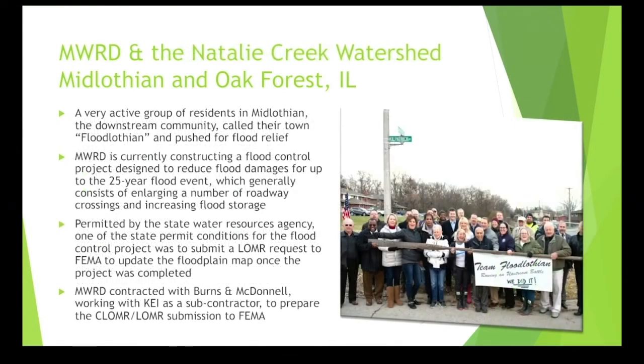While the result of a detailed watershed study performed on Natalie Creek clearly showed a significant problem, a group of residents that had organized around their collective flooding issue was just as convincing in demonstrating the need for a solution. The resulting project will provide significant flood relief through both conveyance improvements and additional floodplain storage. Due to funding constraints, the project will not remove all structures at risk from the regulatory floodplain. However, due to the extent of the watershed-wide improvements, a floodplain map revision is required to satisfy permitting requirements upon project completion.